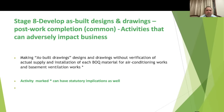Stage 8 is making the as-built designs and drawings post work completion. Key risks include making as-built drawings without verifying the actual supply and installation of each BOQ material for both air conditioning and basement ventilation, and not validating these against what has actually been implemented.